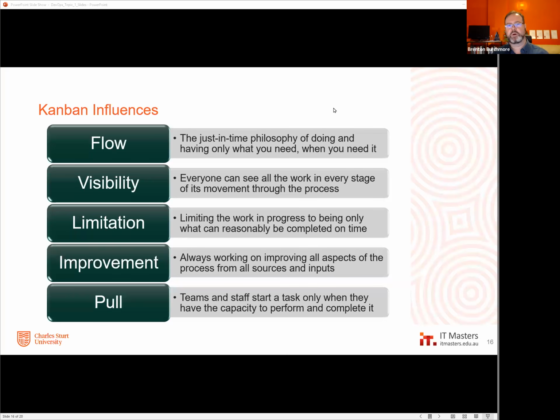This is the Scrum idea as well. This is the idea of the sprint planning. You only put into the sprint what everyone is willing to take on. And in DevOps, you only take on what people believe and understand and can commit to completing.